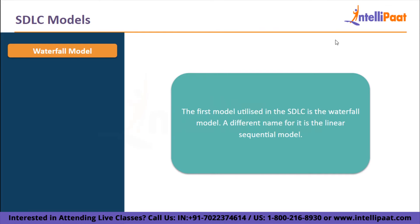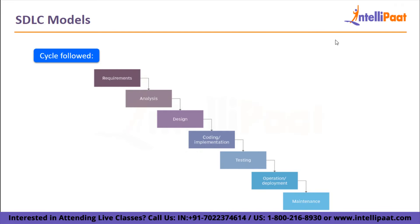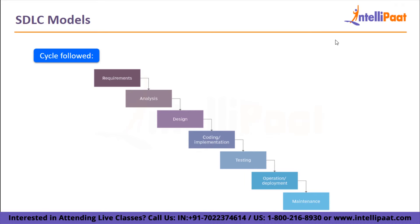The first model utilized in the SDLC is the waterfall model, also known as the linear sequential model. The results of one phase serve as the input for the following phase, and a new phase can only begin after the preceding phase is finished. Requirements are gathered and analyzed first; only once set in stone can system design begin. The SRS document serves as both input and output for the system design phase. Then documents are prepared for implementation and coding throughout the system design and software architecture phases. Coding is completed in the implementation phase, and the software created serves as input for the testing step.